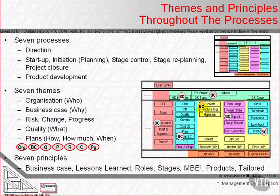At any point in time that the project encounters an unexpected event — a risk or an issue — we consider the impact of those risks and issues on the business case. And eventually, when we arrive at the end of the project, we reconsider the business case and pass on a benefits review plan that expresses how to realize the benefits.